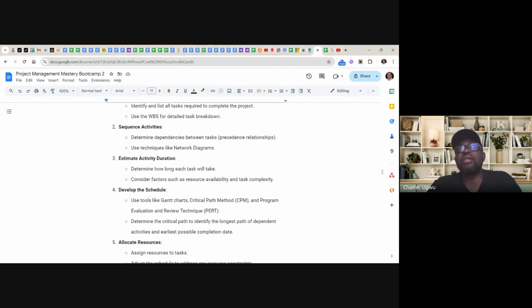Some of these tasks, before you assign the time, you are a project manager. For instance, you are a project manager, not a business analyst. You are a project manager, you are not a developer. So during project planning, if you have some of these key team members, involve them, because many of them are professionals in their area. They have professional knowledge on how long it's going to take to complete a task. Agree with them.